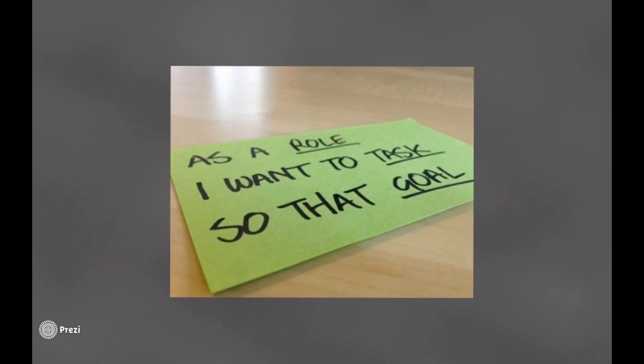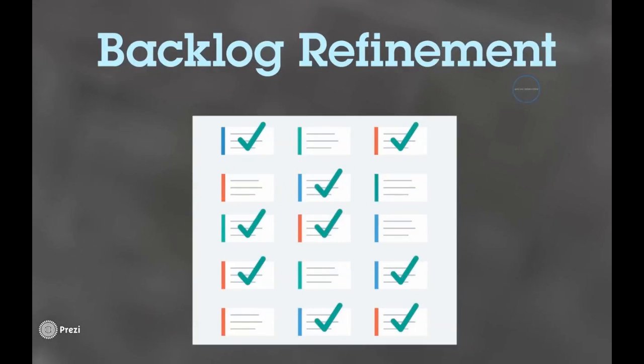But anyway, getting back to the user story, it's in the form of, as a support agent, I want to chat with customers so that I can provide an excellent customer experience. So it's just a way of framing what the user story is. And when the product owner, and we'll get to the product owner in a moment, goes through the product backlog, they add the pertinent details. They're getting feedback from customers. They're talking to their team, getting an idea of, well, what kind of development would this take? Just a preliminary idea. And eventually this becomes a ranked list of all the items in your wish list.